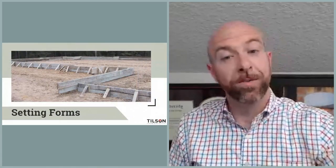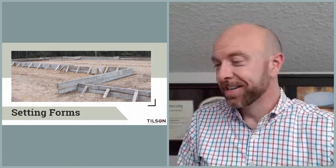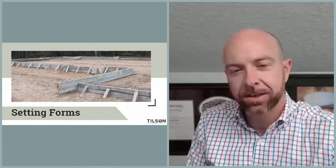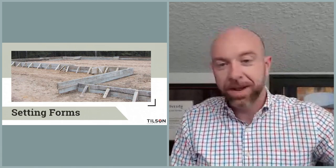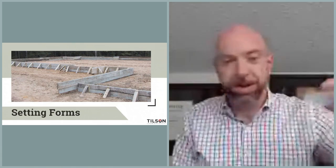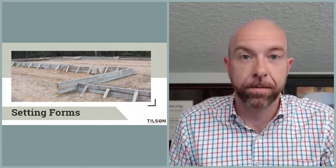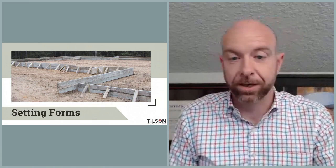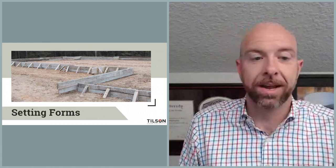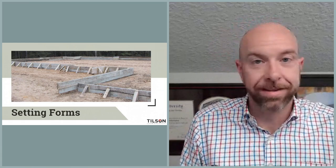And so now we're about to start. We've got all this stuff done. I know this is a construction process seminar, but we are now about to start construction. So a lot of people do ask about, why does it take so long, or why do you tell us it's 10 to 12 months? All this discovery process and the beam depth and beam width and soil test and engineering and septic permitting and utilities, all that has to happen before we can start construction. You don't want to try to go into construction and figure those things out later. That is a bad idea, but a lot of custom builders do that. They get that construction loan closed and they start spending your money. And that's like trying to load a train as it's going down the tracks. It's not a good idea. Very unsafe and not going to turn out good.